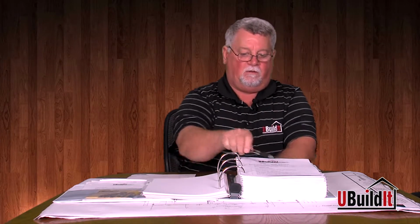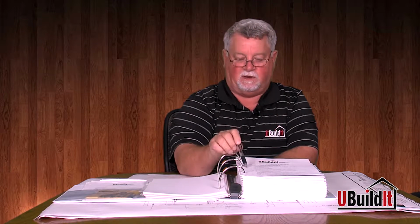After that, we're going to schedule an electrical contractor to come and set up a temporary pole. After they set the temporary pole, if it's in a municipality where it's going to have inspections, the electrician will call in for an inspection. Once it's inspected, the city will release it to the electrical provider, and then they will come out and set the meter as long as you have the contract for service in place.